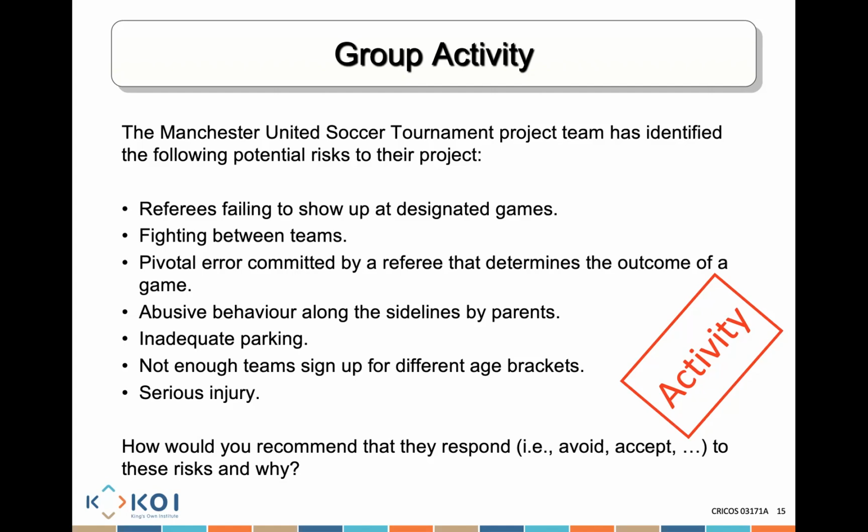What about fighting between teams? What do you do with fighting? We should mitigate it. Yeah, we mitigate it. We might train the referees in how to defuse potential risk, or we might be able to transfer it. Also, we might put in a security guard, as an example.